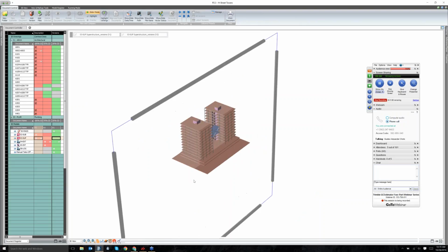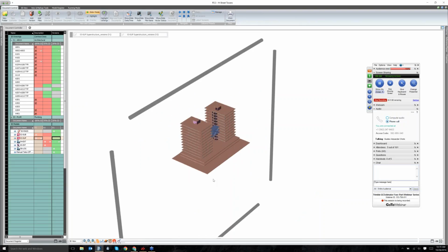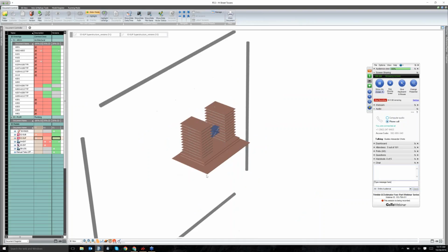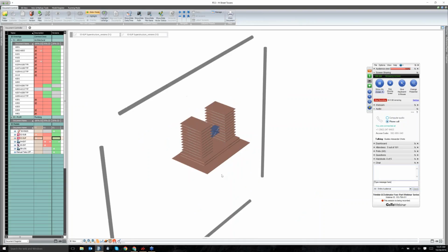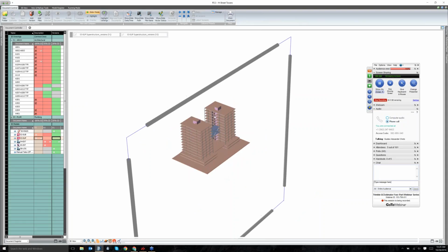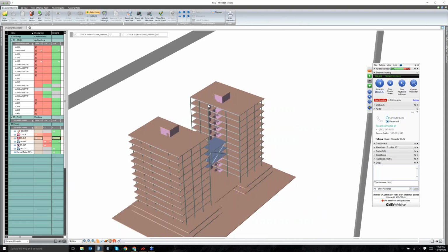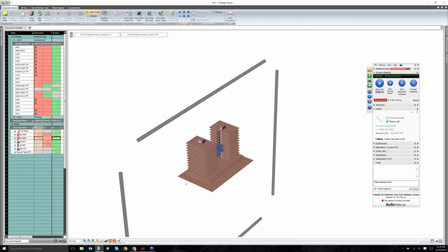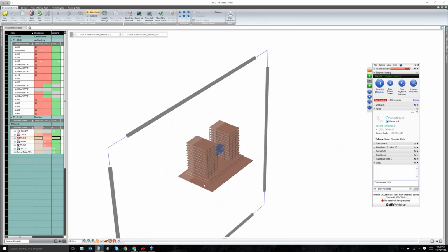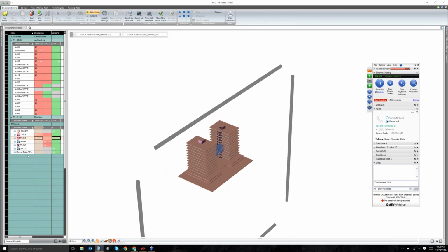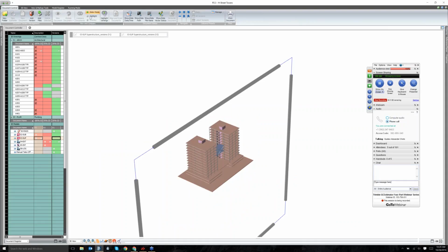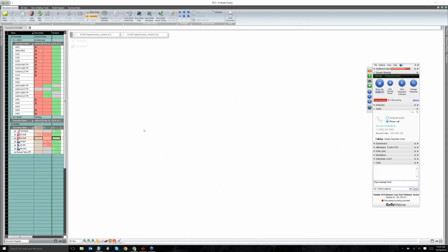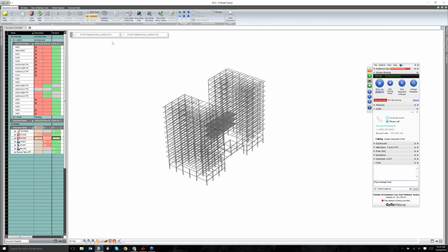So what I can do here is actually grab it and slide it over, and I can see what has changed in that drawing. And I can quickly visualize and see that those staircases have been added from one version to the next. So right away there, instant identification of a scope change. I can also create a highlighted version of that comparison and see exactly what has happened.